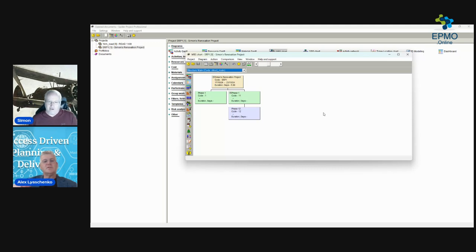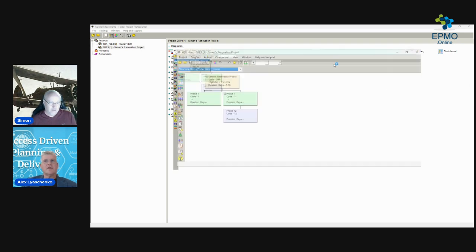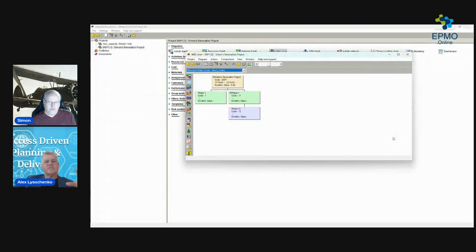So this is for categorization. Like you might have a building WBS and a cost breakdown as well. Okay, I'll give you an example. You're doing a renovation, and you say, okay, I want to build my breakdown structure like room 1, room 2, kitchen, bathroom, and backyard. And then you say the next level, and so on. Another person will do the renovation and say, I will not do it by locations, I will do it by type of works. So I will do electricity, energy, walls. So activities will actually be exactly the same list of activities. So what is WBS? It is a hierarchy of summarization of these activities in a certain way. And there is always more than one way to do this. So one will be your primary one.